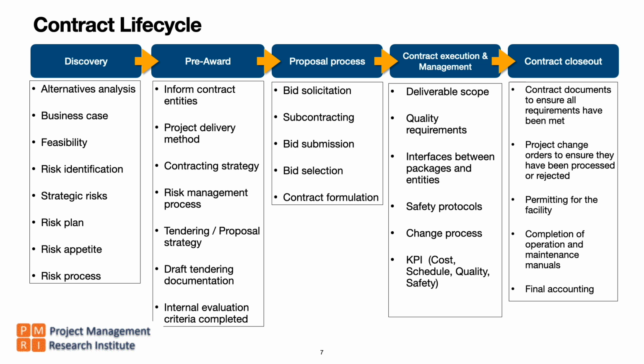In discovery, we do alternatives analysis. In the discovery stage, the owner has an idea about a project and they want to go ahead with the project. So, they do an alternatives analysis. What all other options are there to achieve the same goal? That is alternatives analysis. Then they come out with a business case for the project. They conduct technical feasibility and financial feasibility studies.